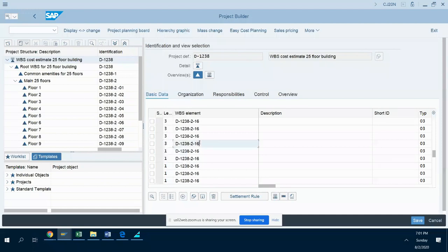In this case, it is 99. We have used only 2 characters, isn't it? Yes, 2 characters will go up to 99. That is the limitation. If you wanted to go beyond, you can only go to 99 in this level.